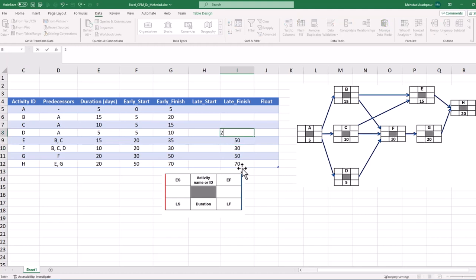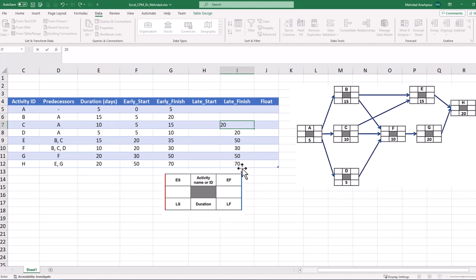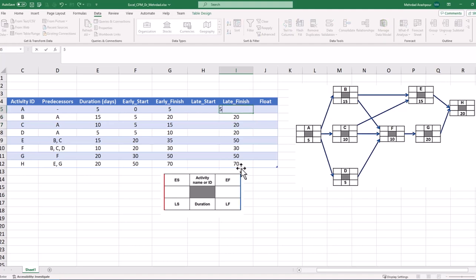The network backward pass is continued to find the late finish date of 20 for activities B, C and D. The late finish date for activity A will be 5 days. This concludes the third step in calculating our project's critical path.